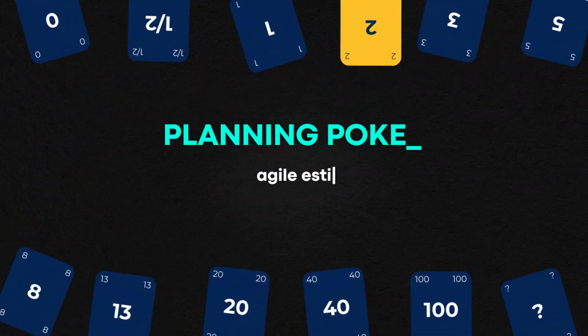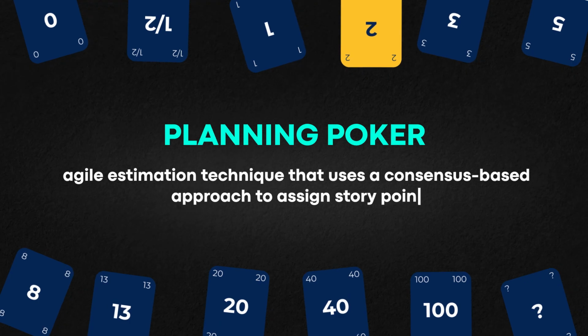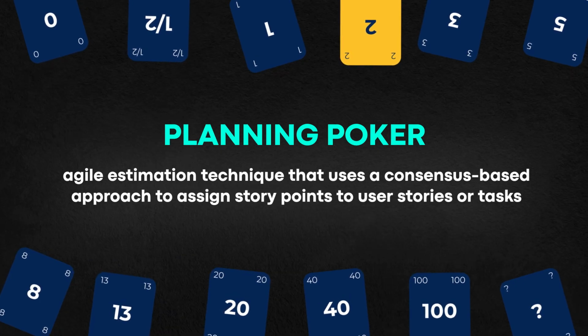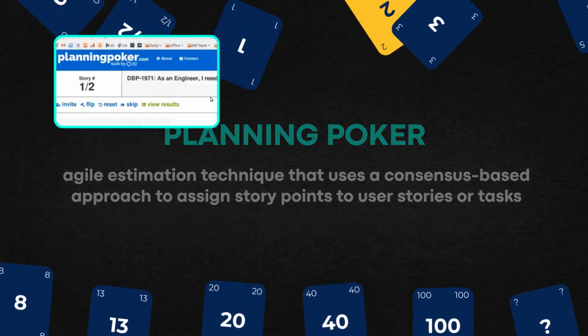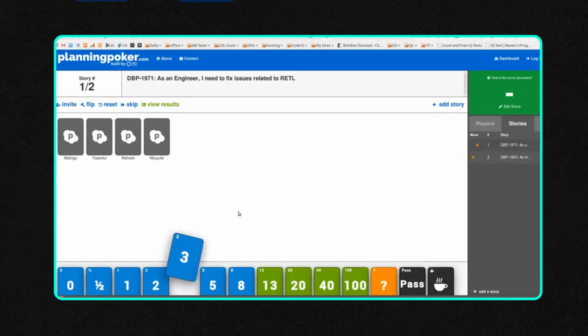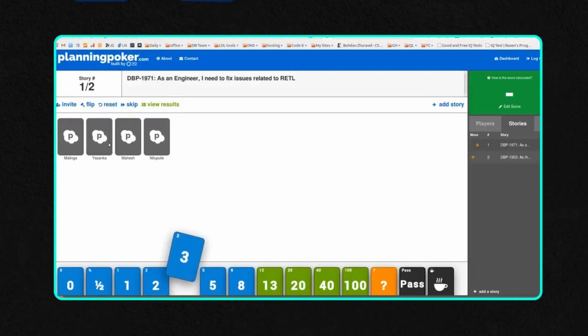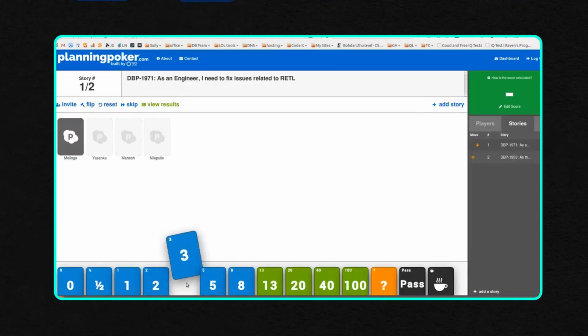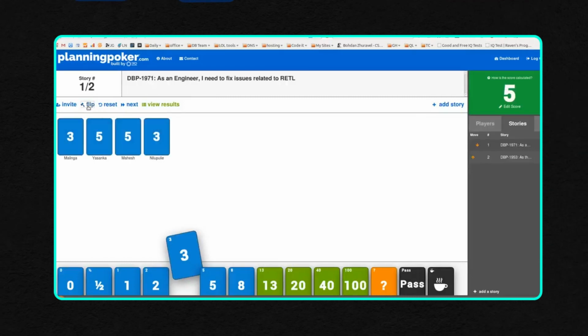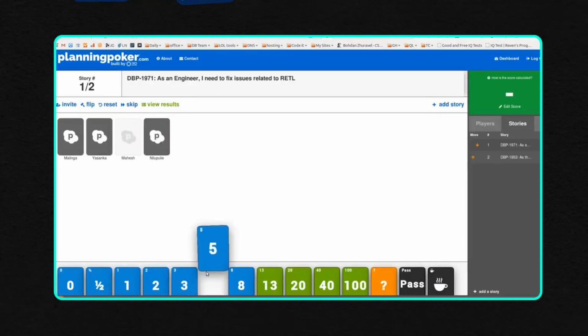There's even planningpoker.com and other apps where you are able to vote on these with those different numbers using whichever method you like, Fibonacci or others. And as a team, it becomes a fun exercise where you get consensus based on the different votes for how many story points you think it'll take. So I highly recommend doing that, especially in a way where you don't see anyone's votes until they're compiled.